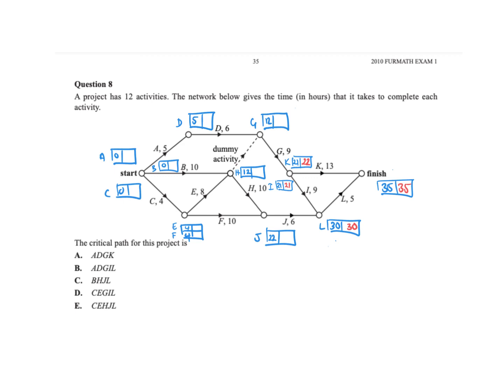And then I'm going from the start of K and I, and then I'm going to go back to G. Now, I have to pick 21 because 21's the smallest at that point. So 21 minus 9 is what? 12. Because you might be getting a little bit lost there, just write that was the 21 minus 9. That was the I way, yeah? Okay, and now we're back at G.